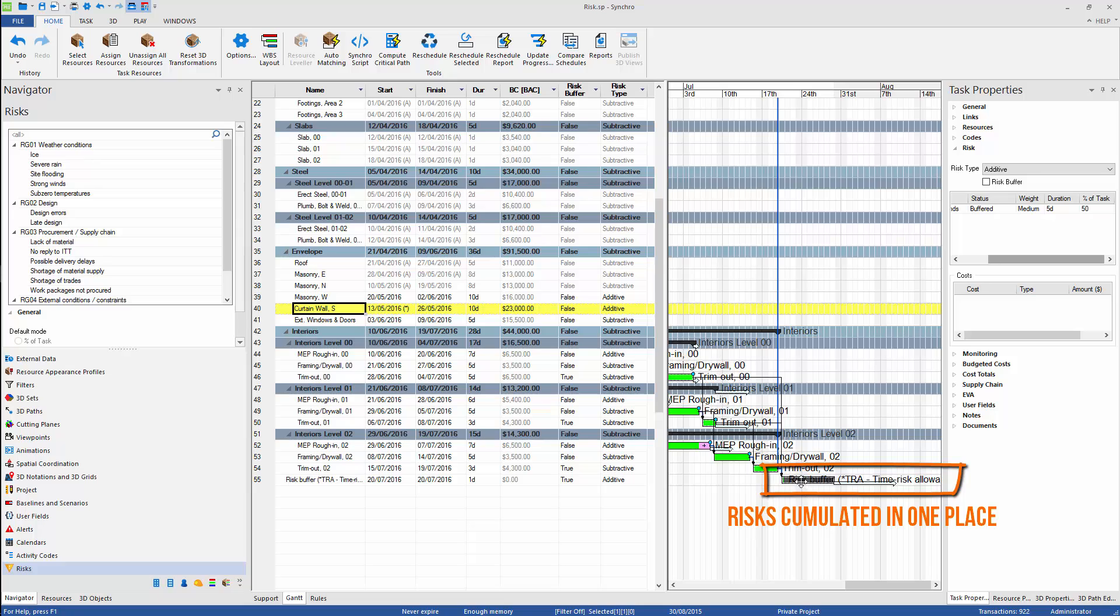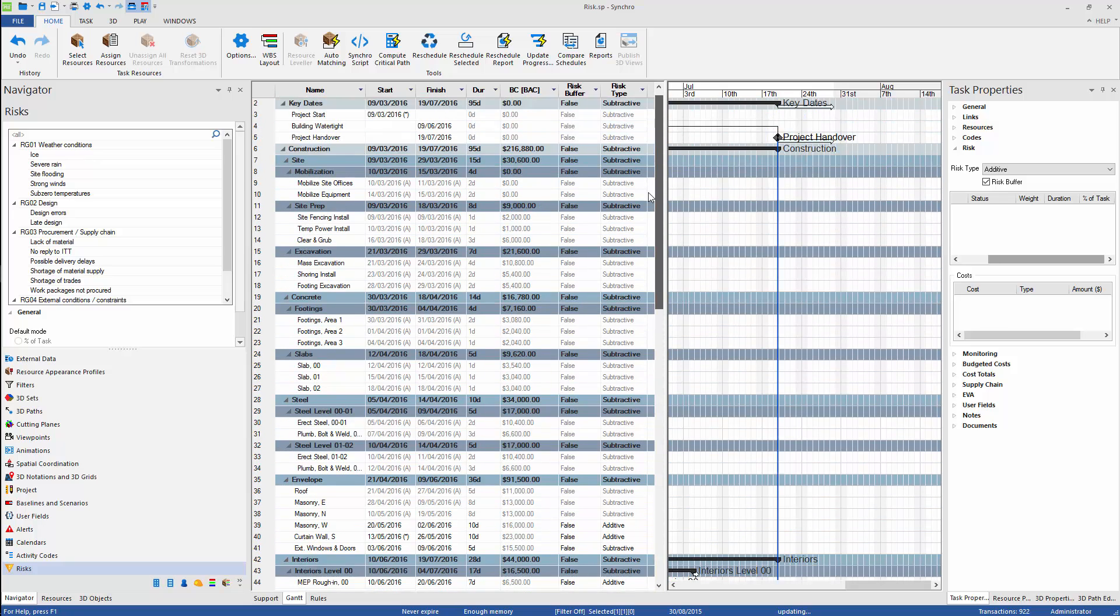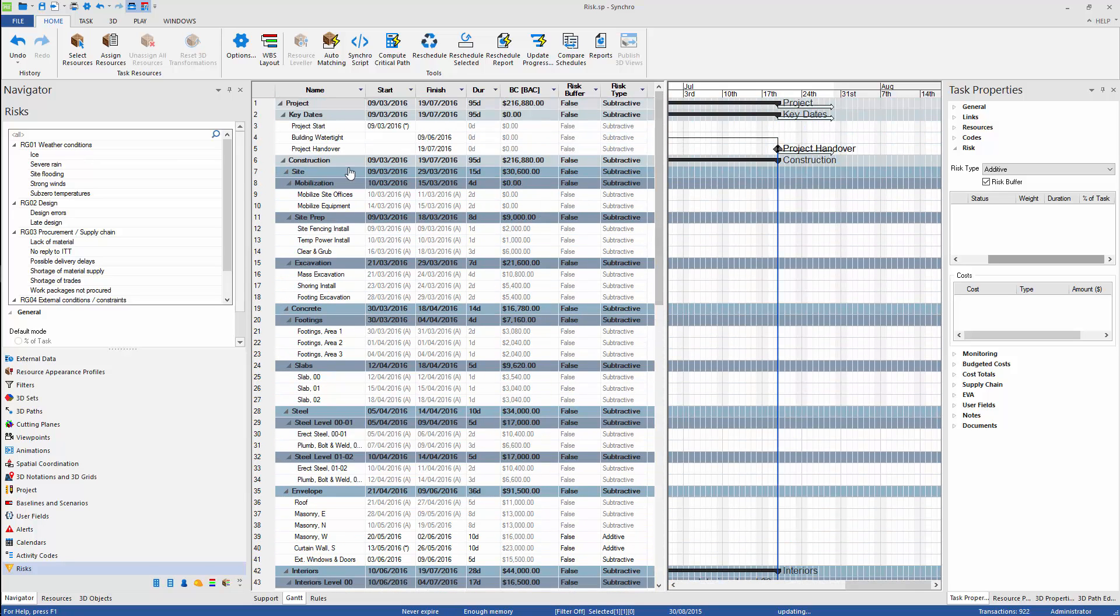Identified risks are now accumulated at the end of the logic chain and the original logic of the program is untouched.